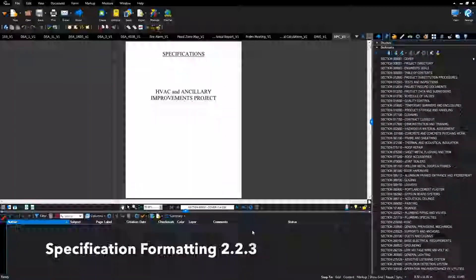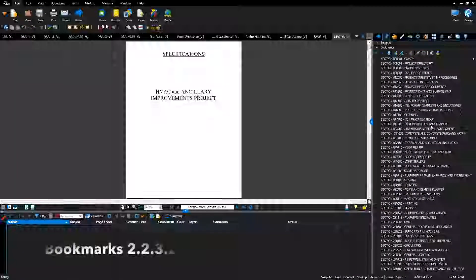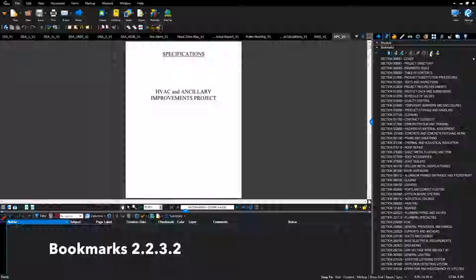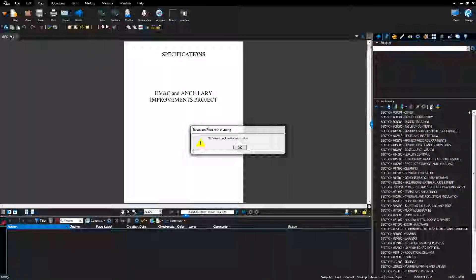Verify specification format: confirm that bookmarks have been created and click the audit bookmarks button to confirm there are no broken bookmarks.